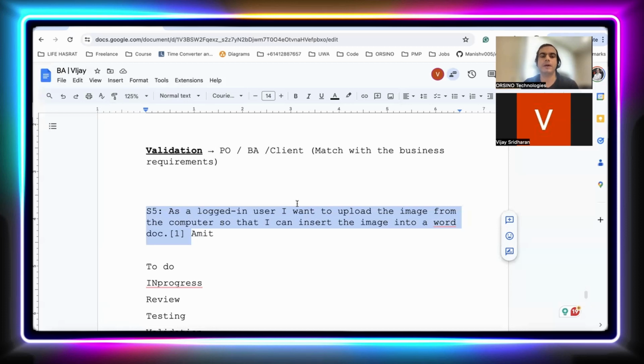And then another part, let's say, if they are not funding your resources. For example, you are building the product for Citibank, and you are working with Accenture, and Citibank is not releasing more funding because you seem not to be working on that type of project. So what you will do, you will pull out all the resources who are working on this project, and you will reallocate them somewhere else, right? So these types of consequences will happen. Your project will be delayed, right? You'll not be able to launch on time. Maybe the issues are still pending. Your team reallocation will happen. Those types of consequences you should be ready to face.